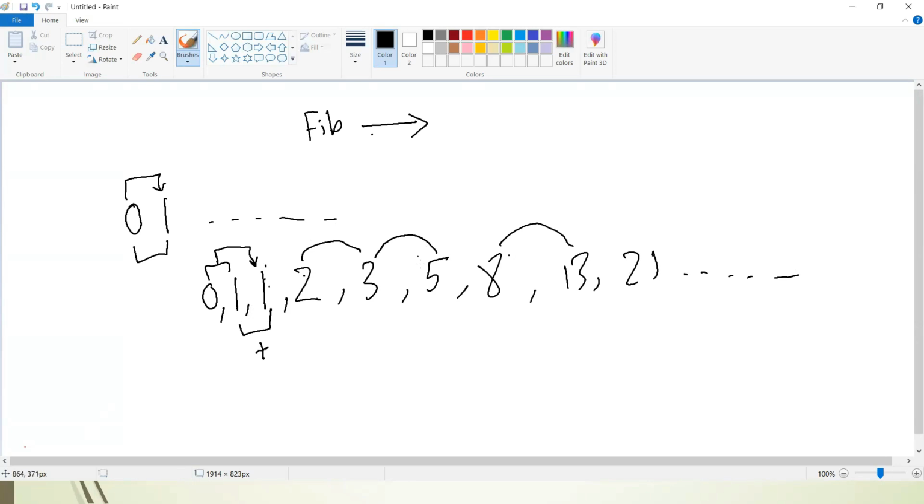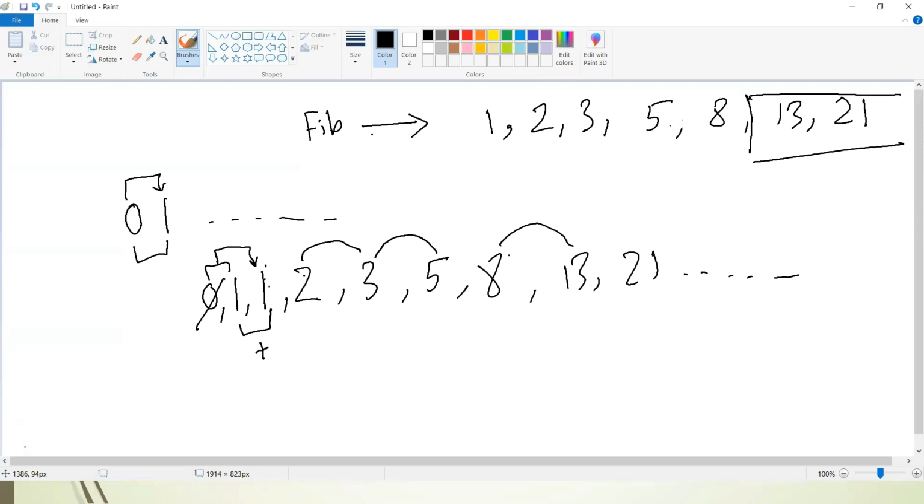Now how can we apply these rules? We should provide those numbers. We will not go with 0, we will start with 1. We can assign 1 to task complexity or user story point. We can assign 2, 3, 5, 8, 13, 21. But I don't think it goes on till 13. The moment it reaches 8, they will stop here and not go beyond this.